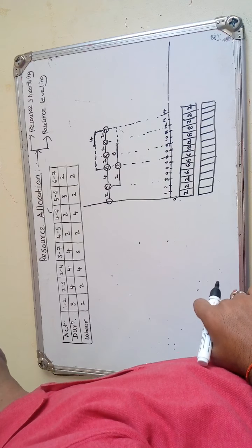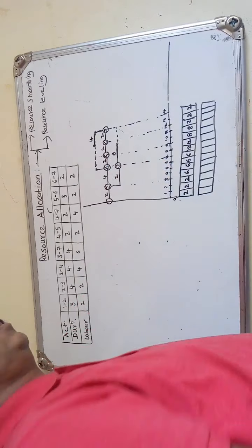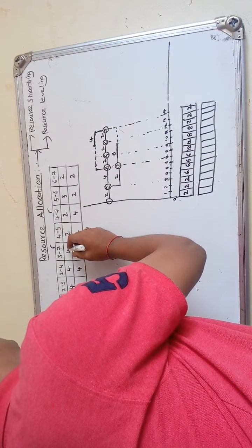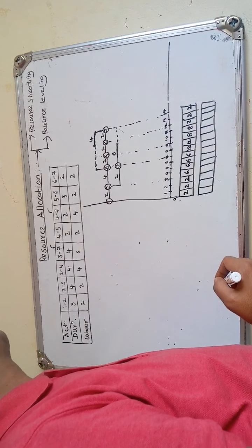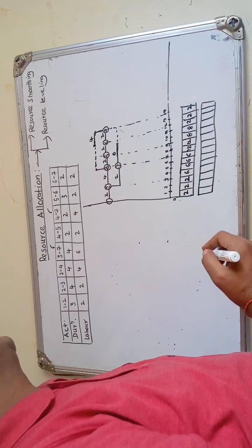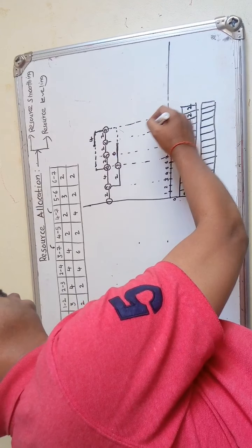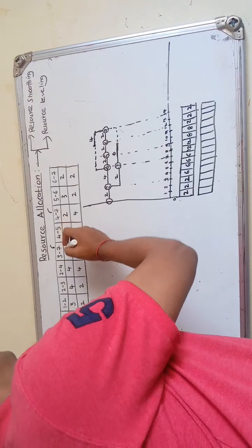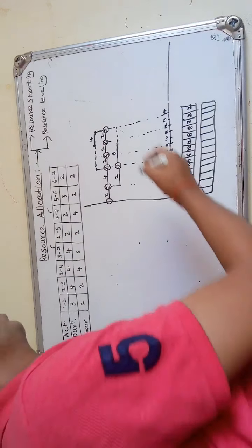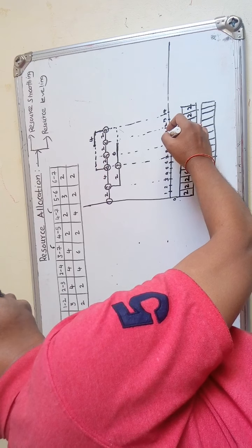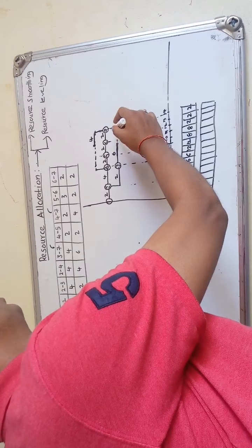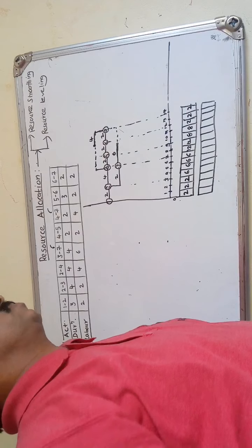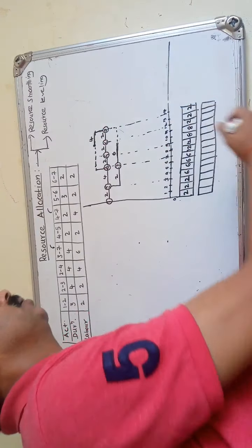Can we shift this particular activity 3 to 7? If we shift 3 to 7, it requires 4 days. If you shift it ahead, what will happen? Only 3 days of extra duration is in hand here, and it requires 4 days. So if you shift, it will start on the 10th day, the demand also gets shifted here, and the manpower requirement will increase. So 6 plus 2 plus 4, then 12 will be on these particular days. So we don't want to shift it now.